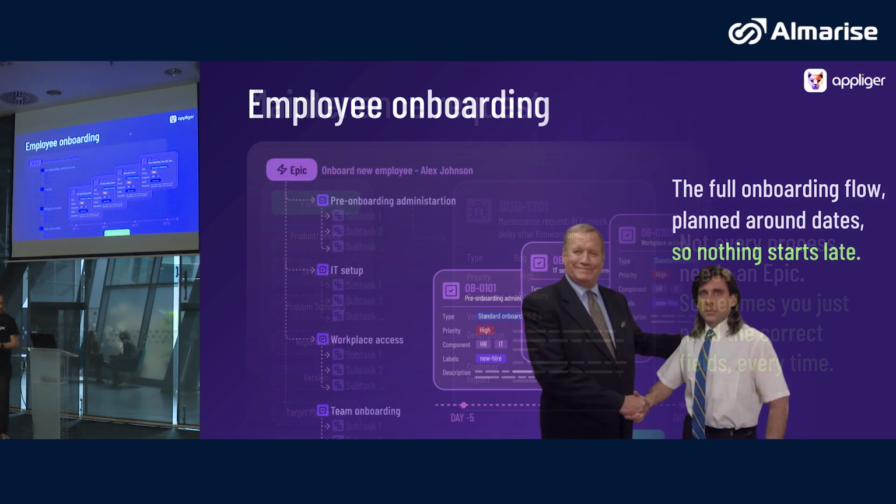And the last one is the employee onboarding process. Again, this is an epic with a set of tasks, some tasks where the person needs to provide proper information beforehand, like variables, again, a form for the user to fill, to provide contact information, IT setup, environments, access, also where the team, where the person needs to be onboarded by the team member, and the start date.